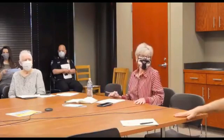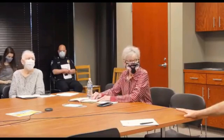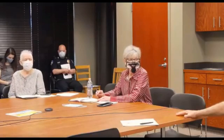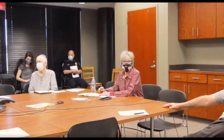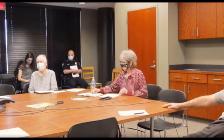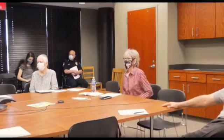Okay, Alderman Beatty? Just for, Mr. Quell, we've issued 15 million in bonds so far. We issued 14, we deposited 15. Just what's drawn out there, just for the estimates on what we look at as we go. Well, the entire project, if we did the full 10 fields, we have value engineered and got that to 19.6, 19.5, which was the number that we had talked with the administration, which is where they wanted us to be. So what happens now is if we're going to stay at 19.5, we button up our plans and we're pretty much ready to go.